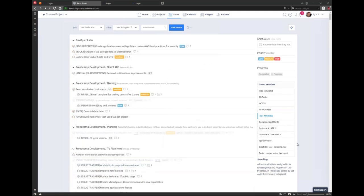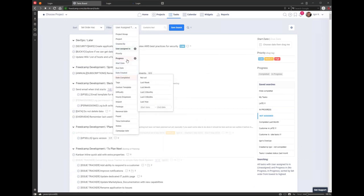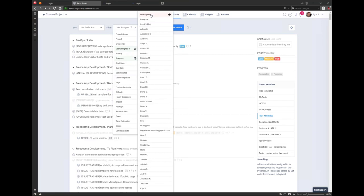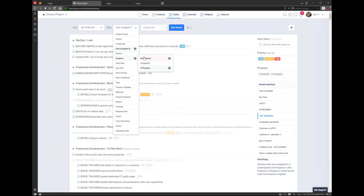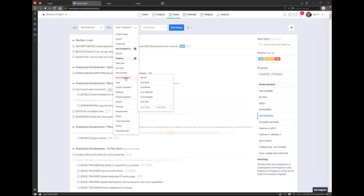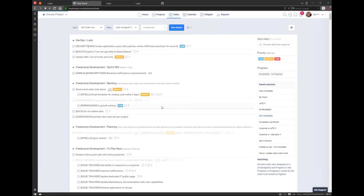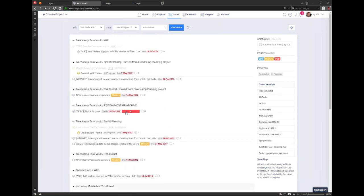As a manager, you may want to see unassigned tasks. You can filter by not assigned, and also filter by progress — no progress or in progress. You might also be interested in tasks that are unassigned and overdue: go to due date, set it to in the past, and this will show unassigned overdue tasks. Nobody will be able to complete them on time if they're due in the past and not started. In our case, we have a project where we store tasks for longer periods — a FritCamp Task Vault Project where tasks are moved so we don't lose them.